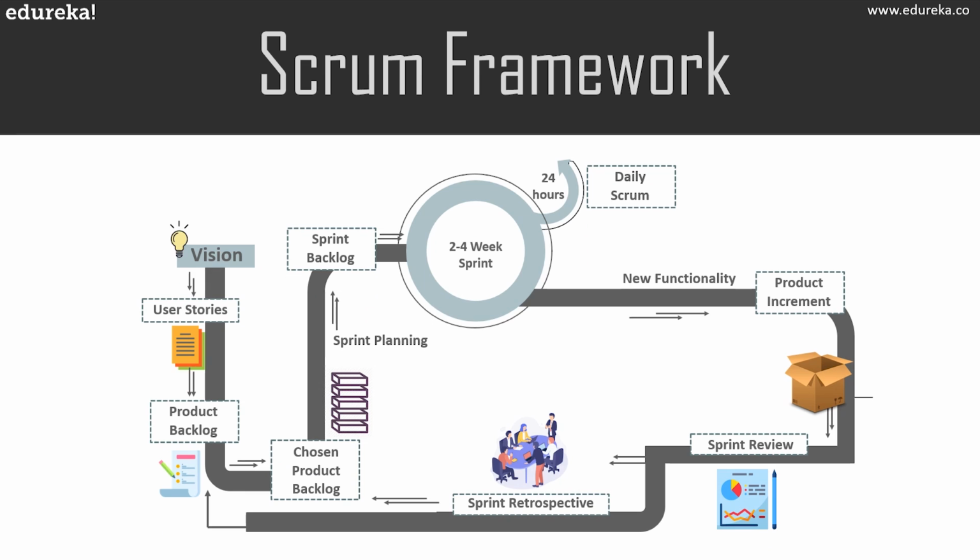After that, they have multiple meetings that discuss how to proceed with the tasks listed in the sprint backlog. We call them daily Scrum. Once the team is sure about what they're supposed to do and what their individual tasks are, they start working on the project. And eventually the sprint comes to an end. At the end of every sprint, they need to have a working piece of product. And that's what we call the product increment.